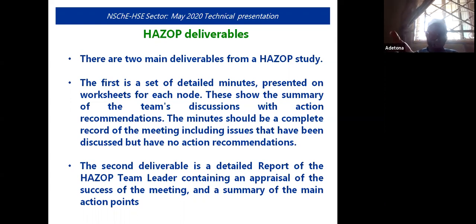The Hazop report is generated by the Hazop team leader. It will include the worksheet verbatim. However, there could be instances where the Hazop team members, who have the project management team members in place, can feel that a particular safeguard, which is low or medium, is adequate. The Hazop team leader, based on their experience, can come out with a higher level of protection. And whatever he puts is owned by them. It's not answerable to the management. It comes to protect its integrity and its wide experience.